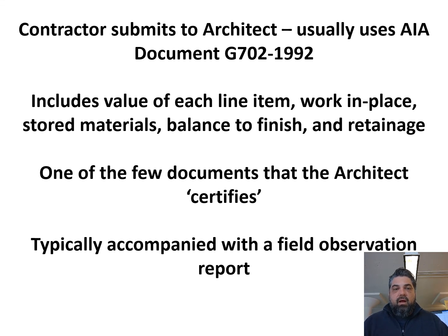And so if there's an instance where materials must be stored off-site, it's important that you, as the architect, obtain pictures of where it's stored and the address that it's stored at. Two, that the subcontractor or supplier has a separate insurance certificate listing the owner as the beneficiary for those items.